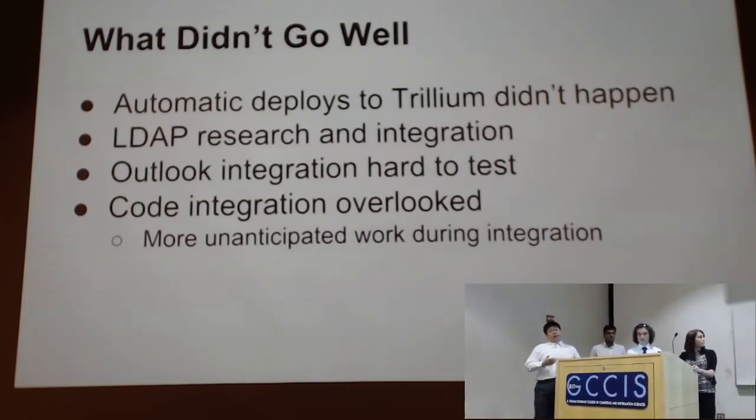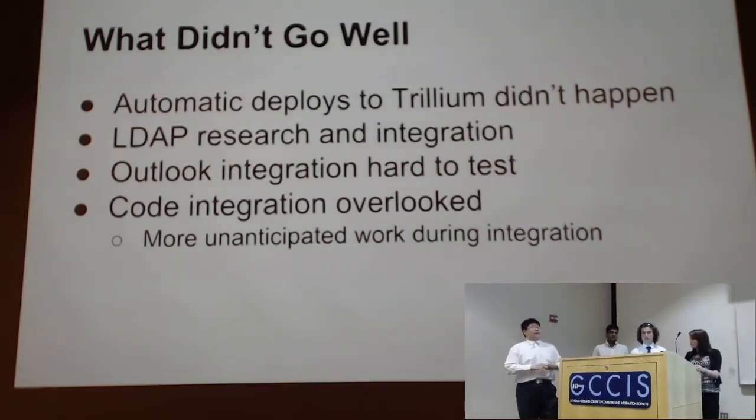Also, LDAP and Outlook caused a few problems for us, mainly because the time it took for researching and integrating these two components took quite a long time, and we didn't really have that much experience with it. Also, Outlook was particularly hard to test on Trillium's environment. And finally, even though everyone on the team was responsible for many areas of our project, no one was really responsible for integrating all the code together. So when we tried to do integration, there was a lot of unanticipated work that we had.